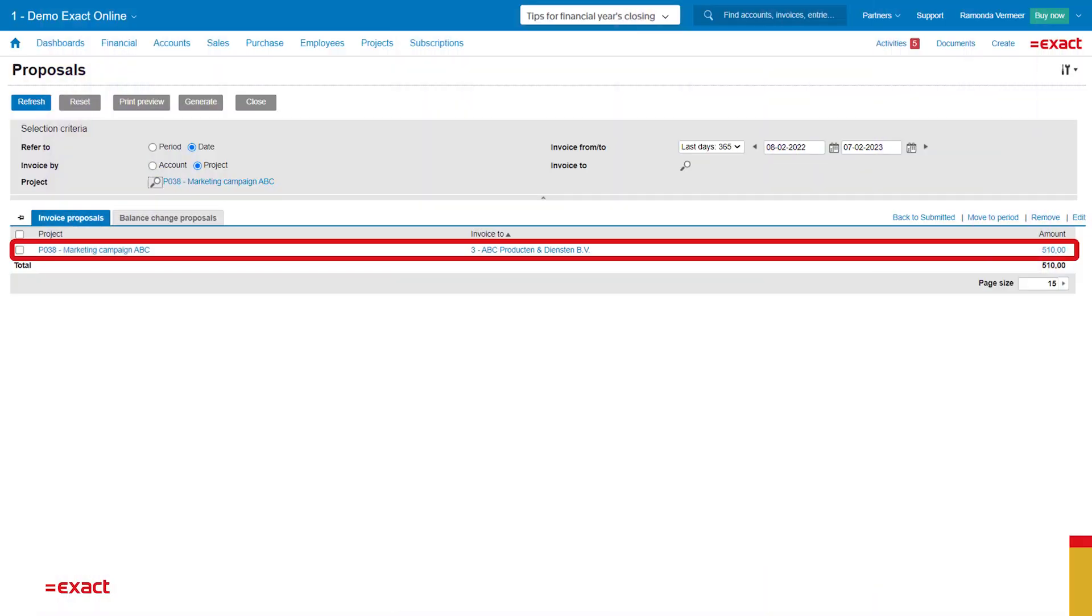Now I am ready to send the first invoice. Because we made this a fixed price project, I set up some invoice terms: a first payment and a last payment. Here we see the amount of the first payment. If I want to know more about this amount, I can click on it and see what it's all about.